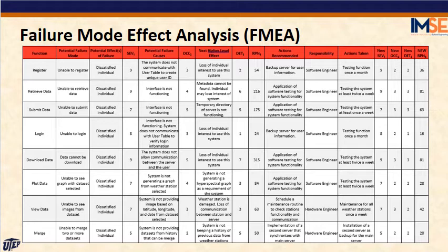The occurrence factor is a 3, so it's likely to happen. And the next higher level effect will be that the user doesn't want to use the system again. So the RPN is 54 and is very high.